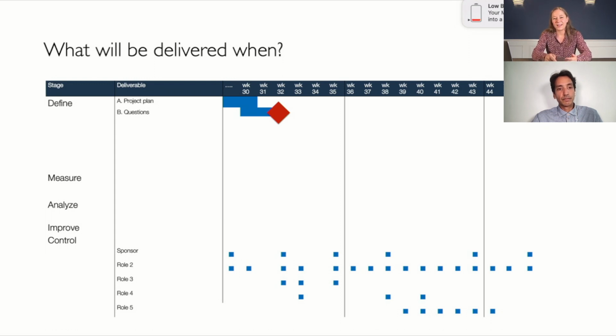So often you have these, here as a diamond shape in red, a milestone. They're often there to have a synchronization point, a communication point to check, for example, a feasibility study. What Rudi just mentioned would be an excellent way to counter one of these very significant risks in a process-mining project: based on a sample of some data that you request very early on, you determine whether it's even available or suitable, and you have that really early as a point in your project, and also by doing that, you manage expectations, right?